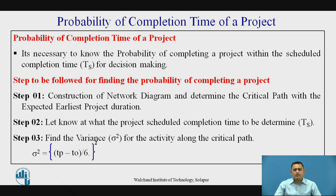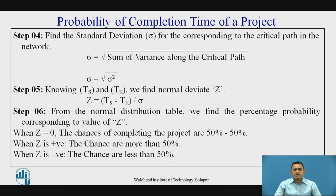Step three: with the help of the overall data of the activities and their durations, calculate the variance using the formula sigma squared = ((tp - to) / 6) squared. Step four: after getting the variance, find the standard deviation for the project using the critical path. The formula is sigma = square root of the sum of variances along the critical path. If there are more than two critical paths, the longest critical path is considered for finding the standard deviation of the overall project.